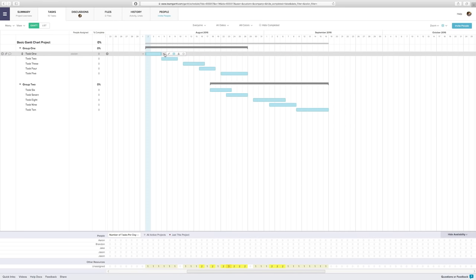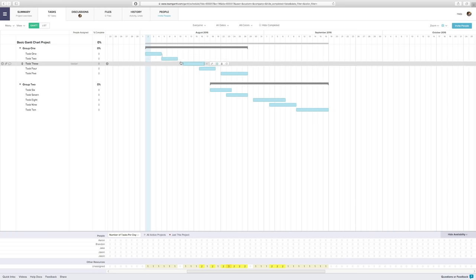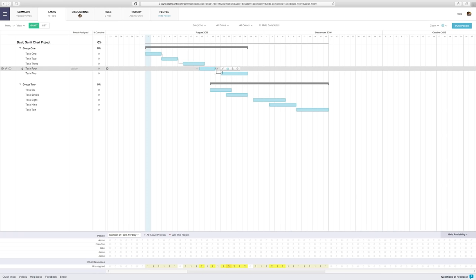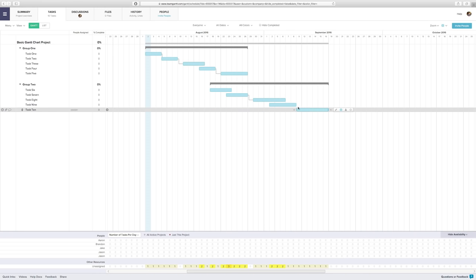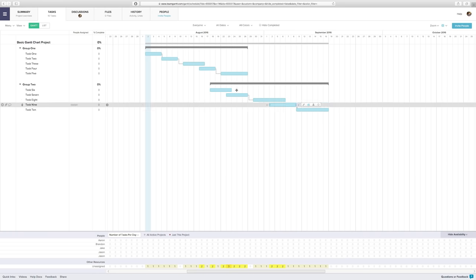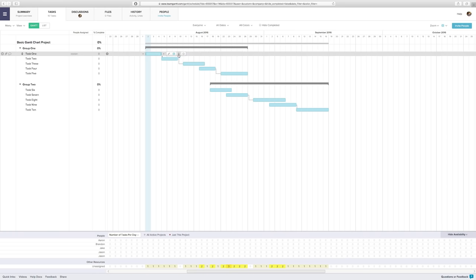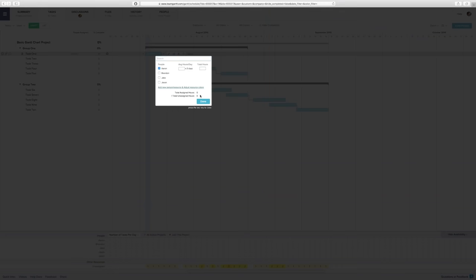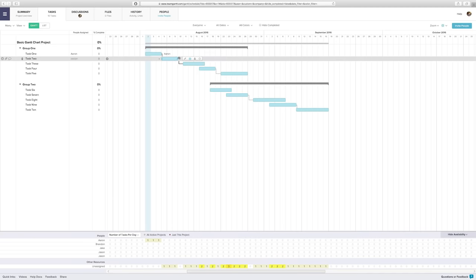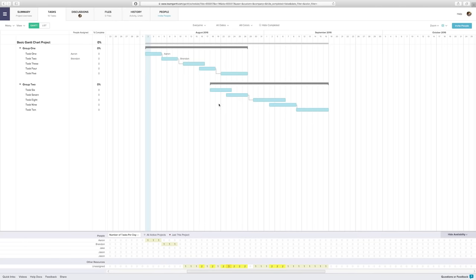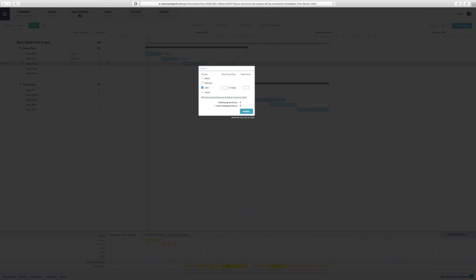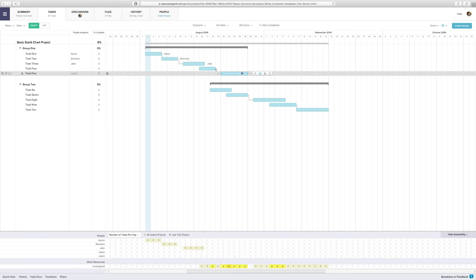You can also add dependencies to make sure each task gets pushed back in the event a preceding task takes longer than expected. I also have some co-workers already invited to this project, so I'll go ahead and assign some of these tasks to them. They'll be notified by email that they've been assigned some new tasks.